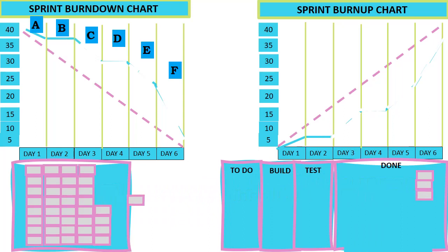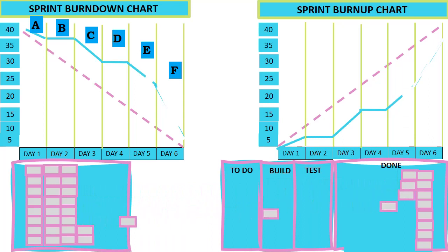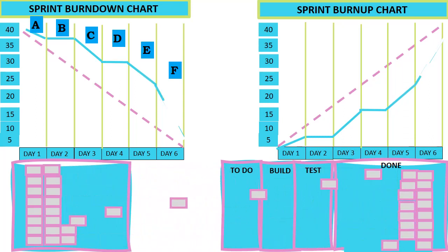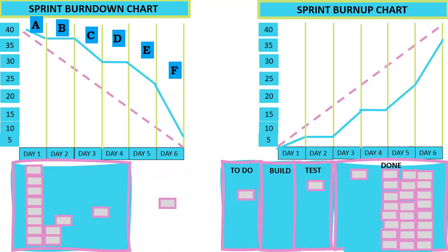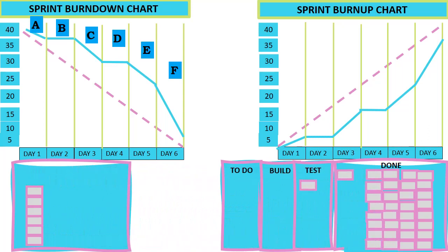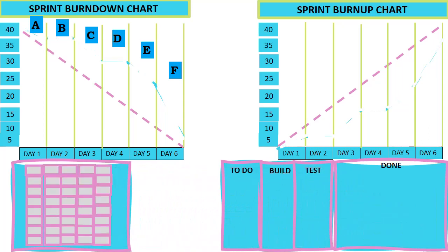If we look at this burndown chart, let us assume that the team gave the sponsor the estimate of project completion after completing Area A. This estimate will not be correct because in Area B, there are no story points completed. Therefore, the correct estimate is much less than what has been submitted to the sponsor. Also, in Area C, there are some story points completed, while in Area D, there is no work completed. Therefore, submitting the estimate when the project is in Area E would give the sponsor a better estimate of the